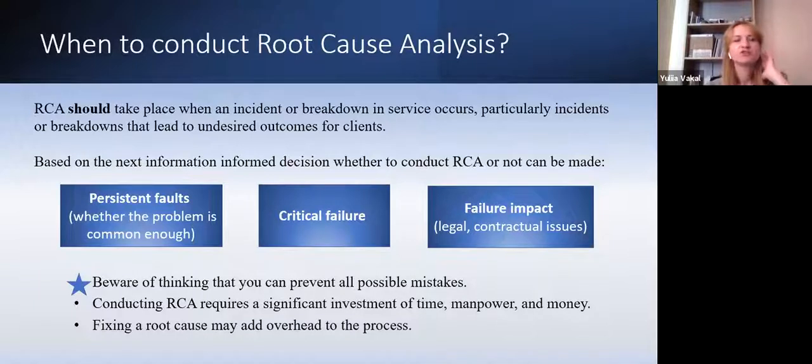So if you know the area, brilliant. If you assign a severity or priority score, that could be the way to go. As I mentioned, for instance, in Pareto analysis, you can start with Pareto analysis and take just 20% of defects, not to take everything, and start with the most important. So you need to define in your team what's probably the most important for you, because you need to start with something which is most important.